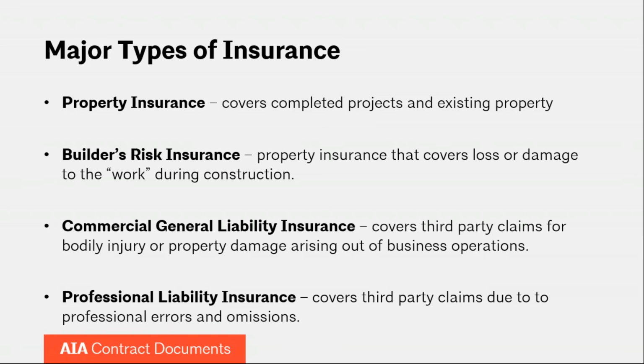We tend to think of PLI insurance as something that is specific to designers, like engineers and architects. And it does cover claims due to professional errors and omissions, but it is possible for contractors, if they are doing any design work, like some of the delegated design I mentioned above, to actually get professional liability insurance as well.